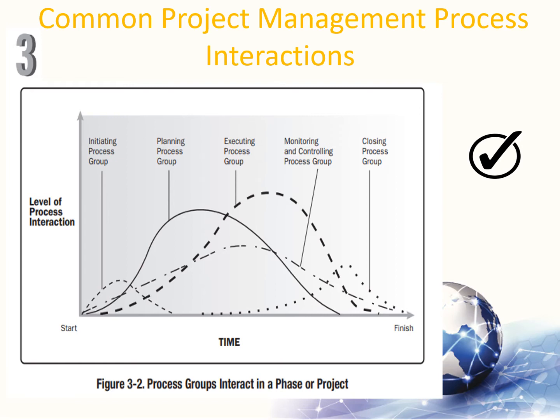The project management process groups are linked by the outputs which are produced. So, the process groups are seldom either discrete or one-time events, and they are overlapping activities that occur throughout the project. The output of one process generally becomes an input to another process or as a deliverable of the project or sub-project or project phase. Deliverables at the sub-project or project level may be called incremental deliverables.